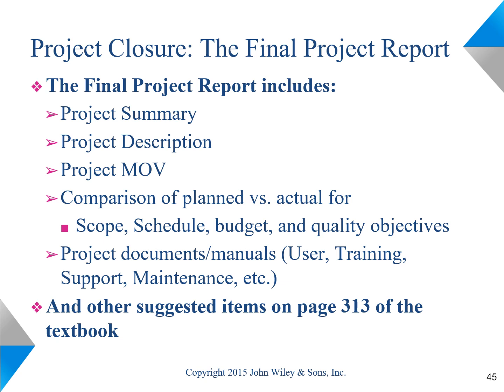One of the key documents that need to be prepared and finalized during project closure is the final project report. It contains the summary of the project, the description, the MOVs, the information about the planned versus actual budgets and schedule, the status of the deliverables and when they were put in place, the project documentation that has been developed, and all the lessons learned to be passed on to future projects.